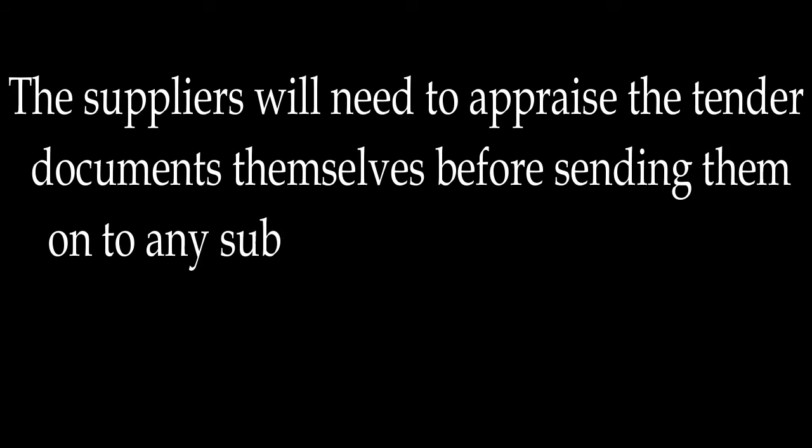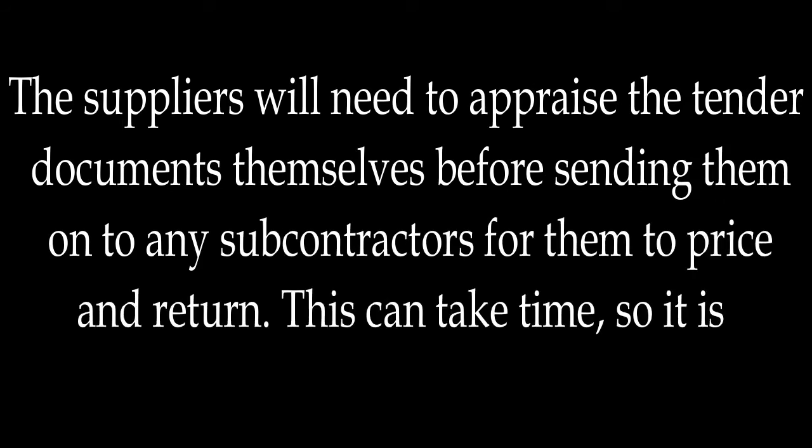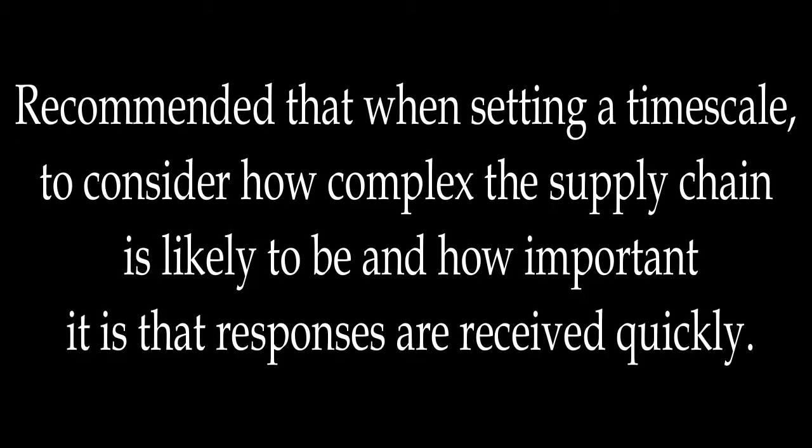The suppliers will need to appraise the tender documents themselves before sending them on to any subcontractors for them to price and return. This can take time, so it is recommended that when setting a timescale, you consider how complex the supply chain is likely to be and how important it is that responses are received quickly.